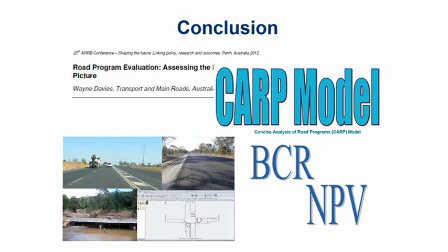Given the lack of information, because often if there's a lack of information, we'd adopt a more conservative approach to evaluating the benefits, and that would actually undervalue the benefits in many cases. So we'd be looking at some projects that maybe got a benefit cost ratio of maybe a 0.84 or something. That could eventually get above 1 once we've actually incorporated more information. And in the case, the lack of information often falls on the benefit side. There's more stuff available to incorporate in the capital costs, as a lot of that information is closer to the time of construction. Benefits-wise, that carries out throughout the life of the project. And we used 30-year project lives for most of these projects. So there's a lot of uncertainty around that. So that's actually 3 ways of looking at it and how that was done.